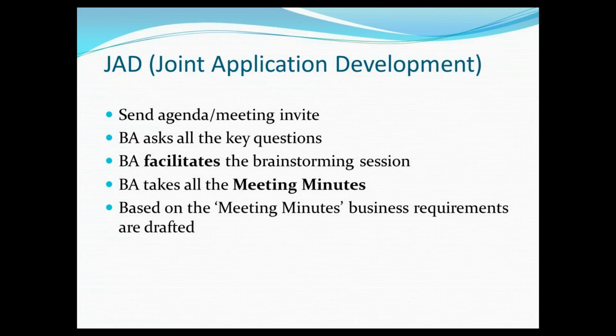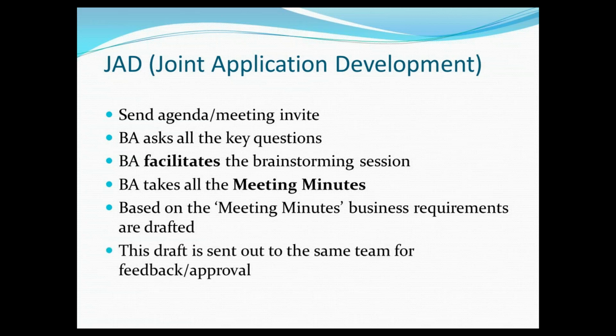Once the meeting is over, based on the meeting minutes, you will be documenting the business requirements. You, the BA. You will document the requirements. Once the requirements are drafted, you will send them for approval and feedback. Feedback from whom? From everybody who attended the meeting. What meeting? The chat session.